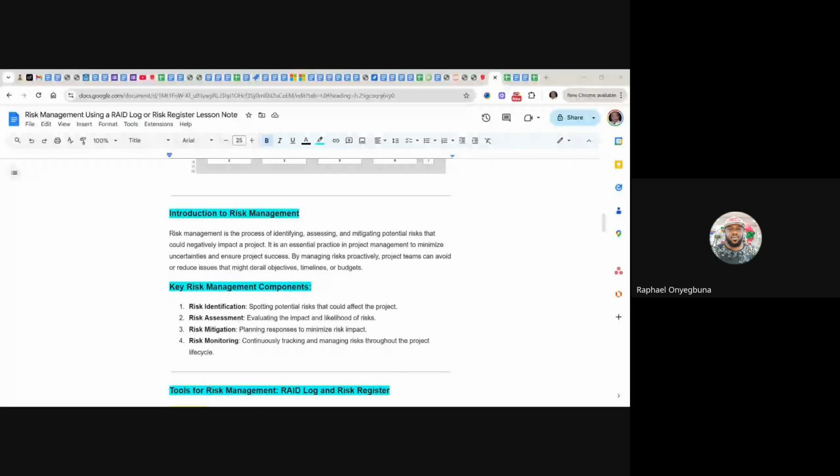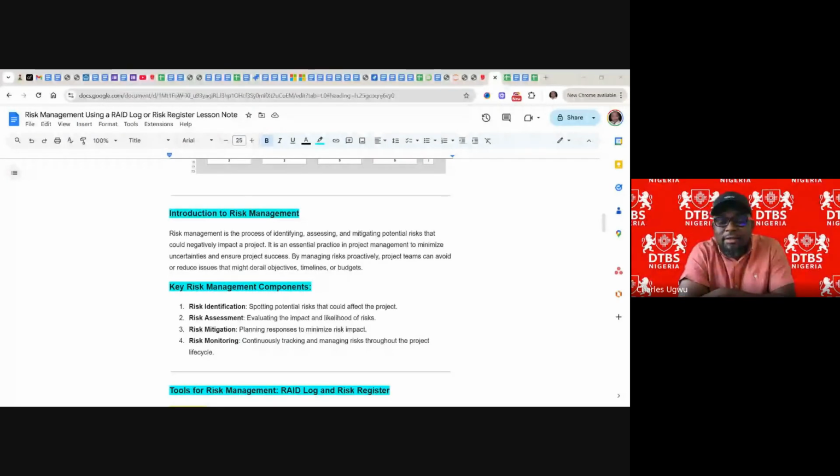Okay, Raphael. Yes, good evening, Mr. Charles. Yeah, good evening. So, an example of risk could be change in exchange rates. Okay, fluctuations. Yeah, fluctuation in exchange rate, because at the point of engaging maybe a supplier, the value of the dollar might say today is 1,570, and in terms of execution, it has risen to about 2,000. So that gap is also a risk. Okay. Yeah. We've captured that.